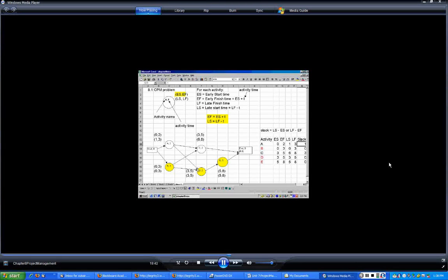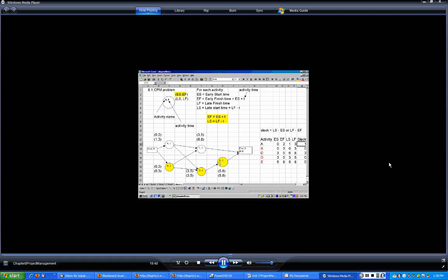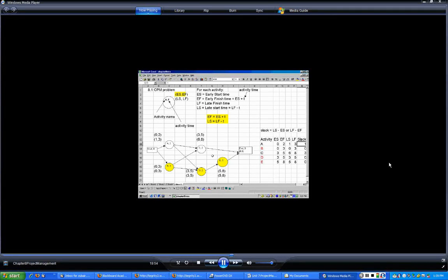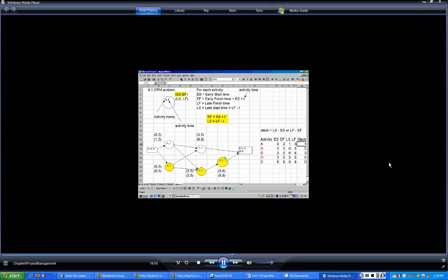Okay. Then to take reservations, you should have mailed the brochure out, so that's what leads to that. Okay, now when you do all those things, this project has come to an end. So here are activities C and D that do not have any arcs leading out from them. So now basically they are the last activities of the project. Let's take an arc from them and put it into this. That signals the end of the project.